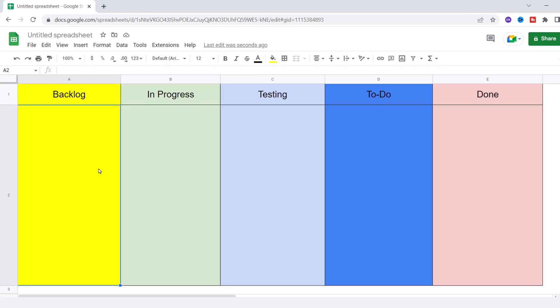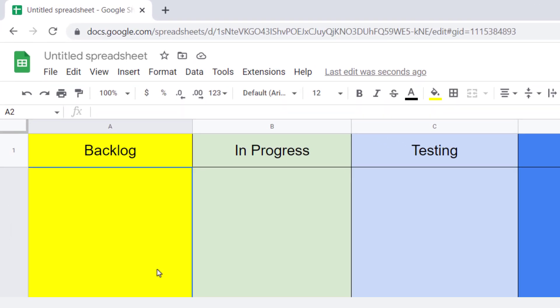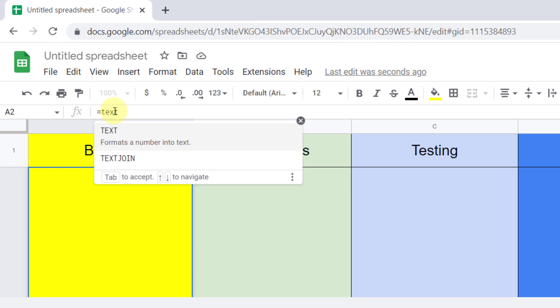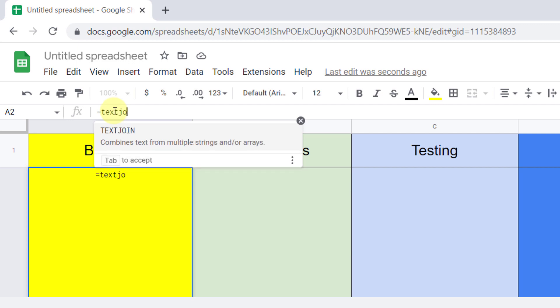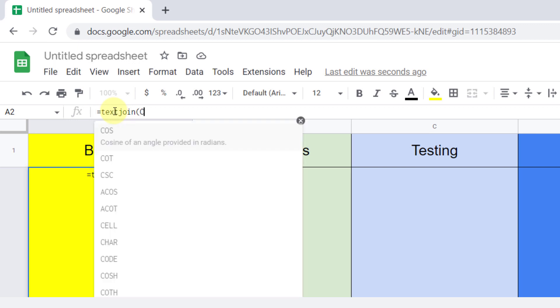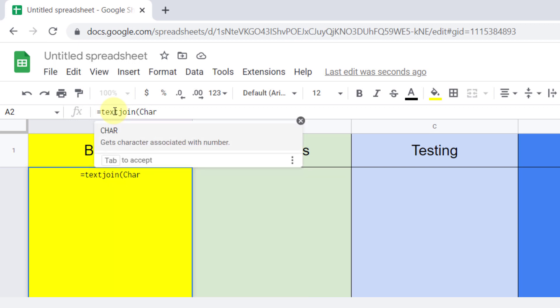So equal sign, TEXTJOIN, open parentheses. I want to have all tasks that have backlog status in the backlog card and separate them from each other with Alt+Enter. I need Alt interaction for the delimiter, so I use CHARACTER 10.